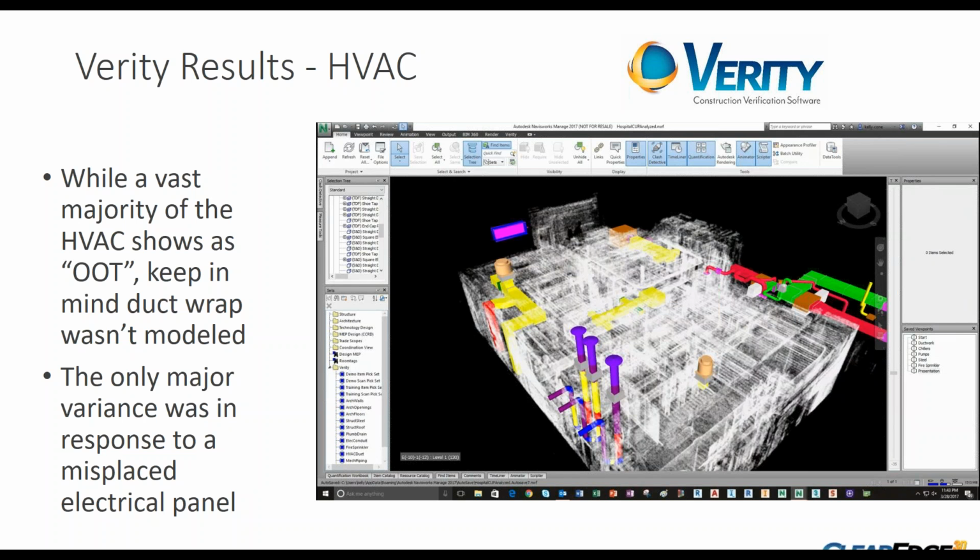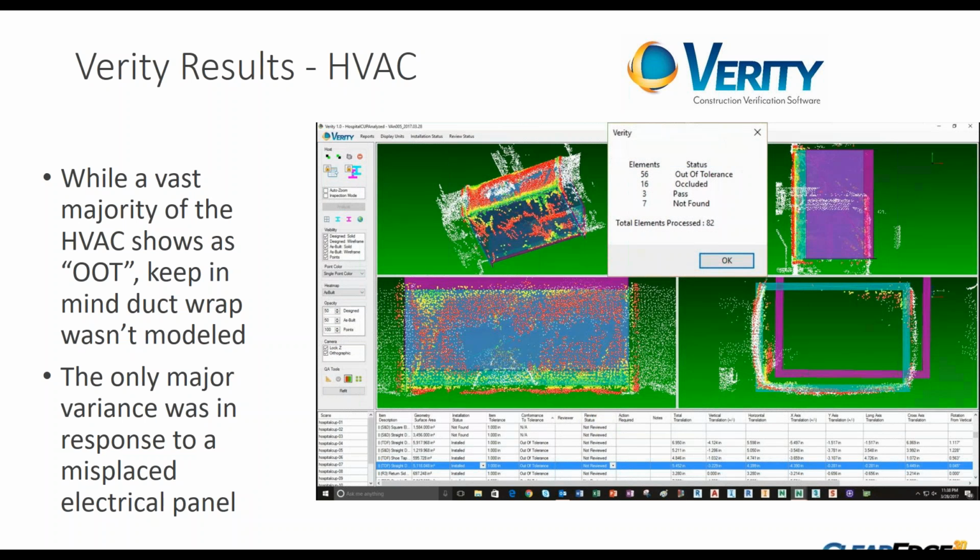So in this case, the dimensional numbers that we reported out had some error in them as a result of that discrepancy. But we did find something interesting: over here on this side of the building, you'll see this ductwork that's flagged as missing. That piece of ductwork had to get moved because of an electrical panel that was misinstalled. But that was really the one part of the ductwork that we caught that needed an update to the as-builts. You can see here that heat mapping of the points against the duct insulation gives us a little bit of a challenge to work with.